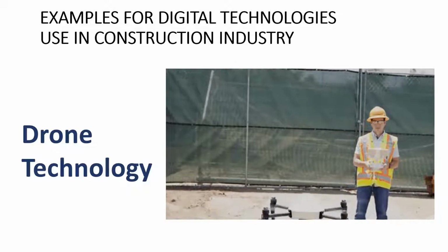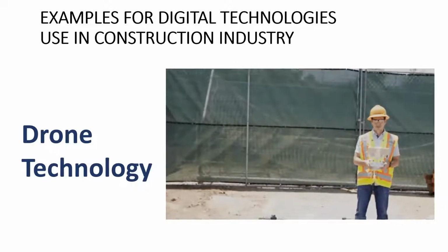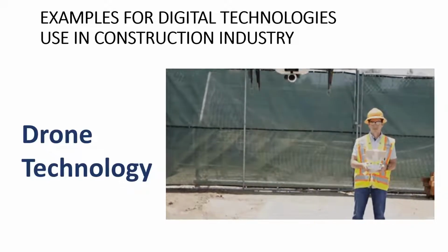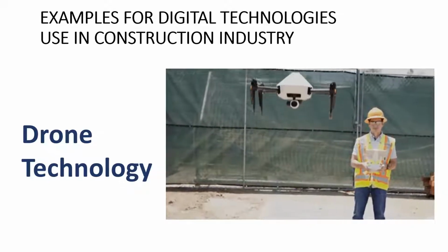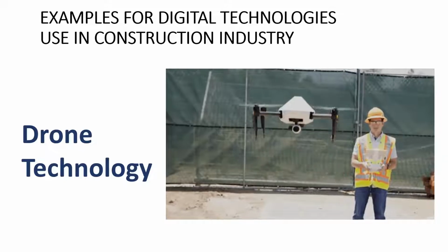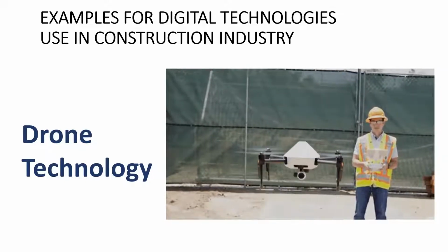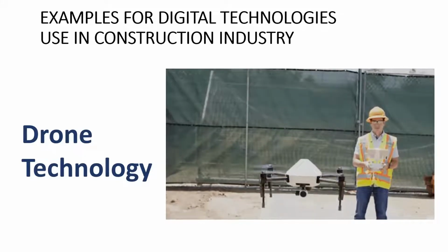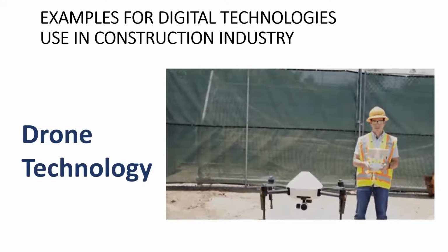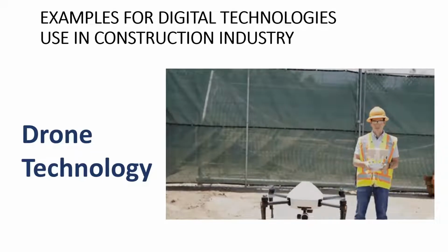So you can run a drone on top of a construction project and capture images. Then you can process those images by using software like Autodesk Recap. Then you can create a 3D model of your building. Then you can import that 3D model into software like Autodesk Revit.